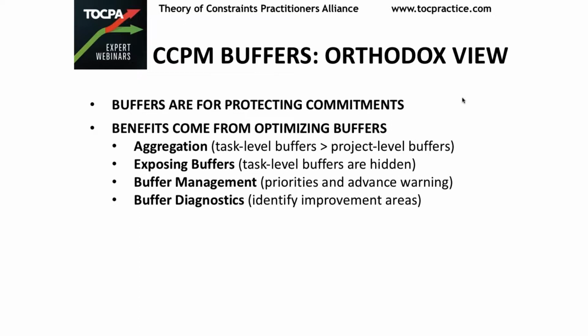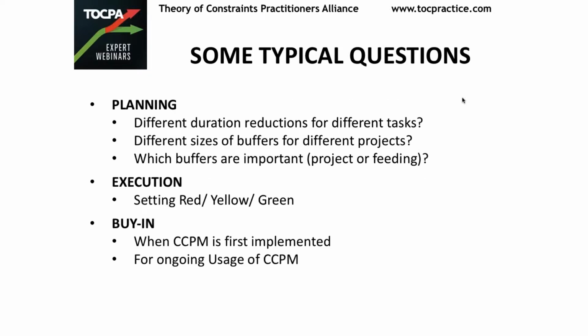There is also the idea that buffer management gives you some benefit, which is by putting your resources on the right tasks, by giving the right priorities for resources as well as for management, and also providing advance warning so that you can look forward into the future and make some course corrections before the fact rather than after the fact. So that also leads to some benefit. And finally, buffer diagnostics, which is once you have executed for a certain period of time, you can analyze the causes of buffer consumption and identify improvement areas. Right, so this is the orthodox view.